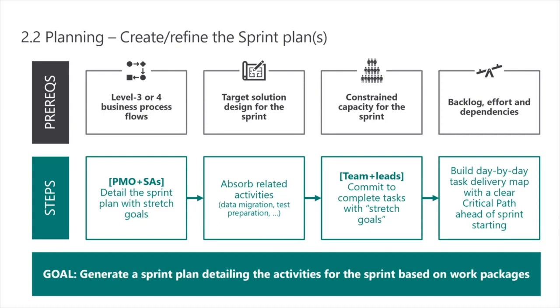And you add some stretch goals in there, and it's important you add those stretch goals, because in projects things happen, right? You can end up with a process that just gets blocked. You can't make progress on it because of something unforeseen. You then don't want dead time with the project. You want to be able to go to your backlog. There's something that's already groomed. You already know how you're going to be able to deliver that at a high level. You pull it into the sprint. You make sure that the total effort is decrementing in the right way. So you're not building up a big backlog. You're not creating technical debt.